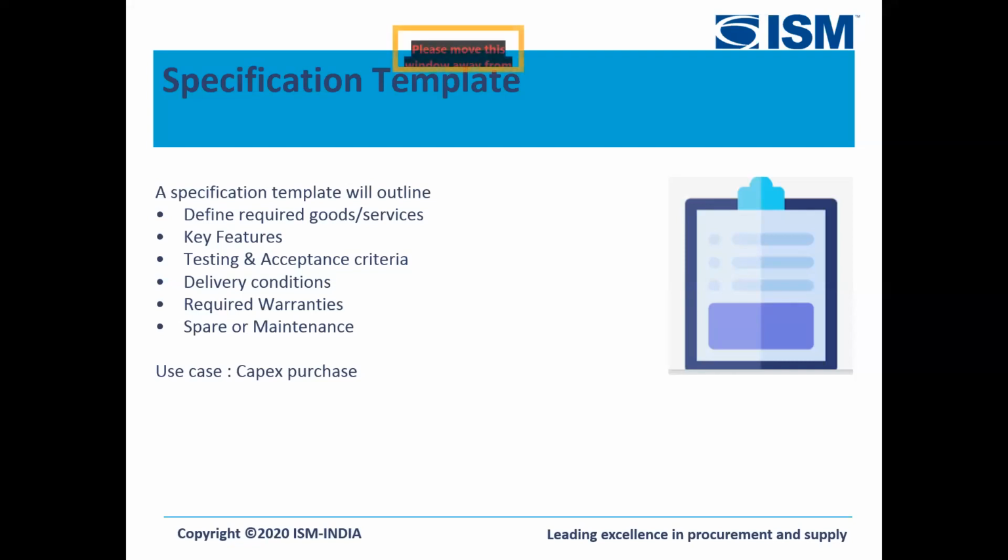So if we can have testing criteria both at the supplier's end and at our end after the installation and commissioning of the machine, and we mention it clearly beforehand, we are able to convey a message to the supplier that we are aware of what the product is, and we would not be buying it just basis their brochure.